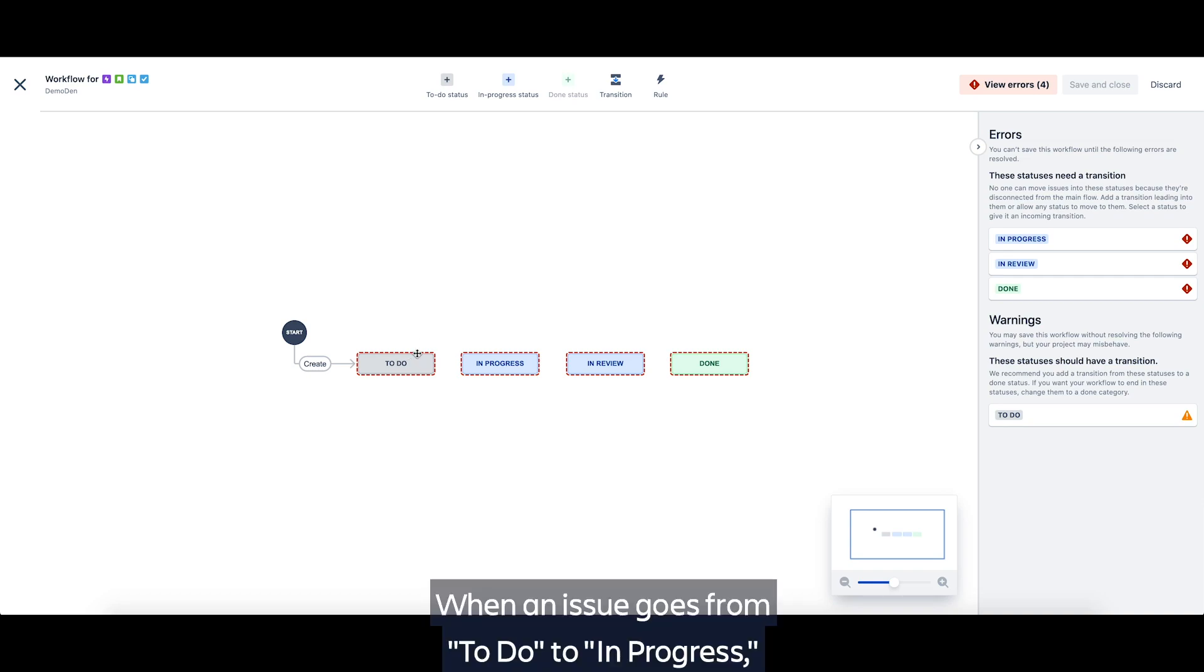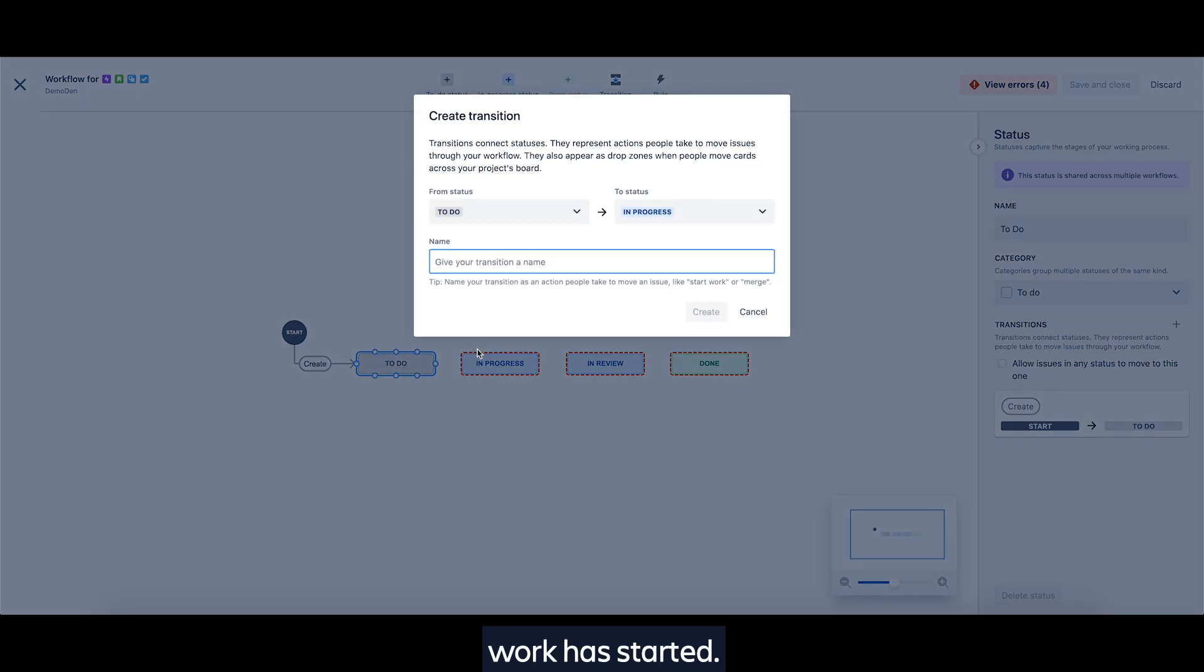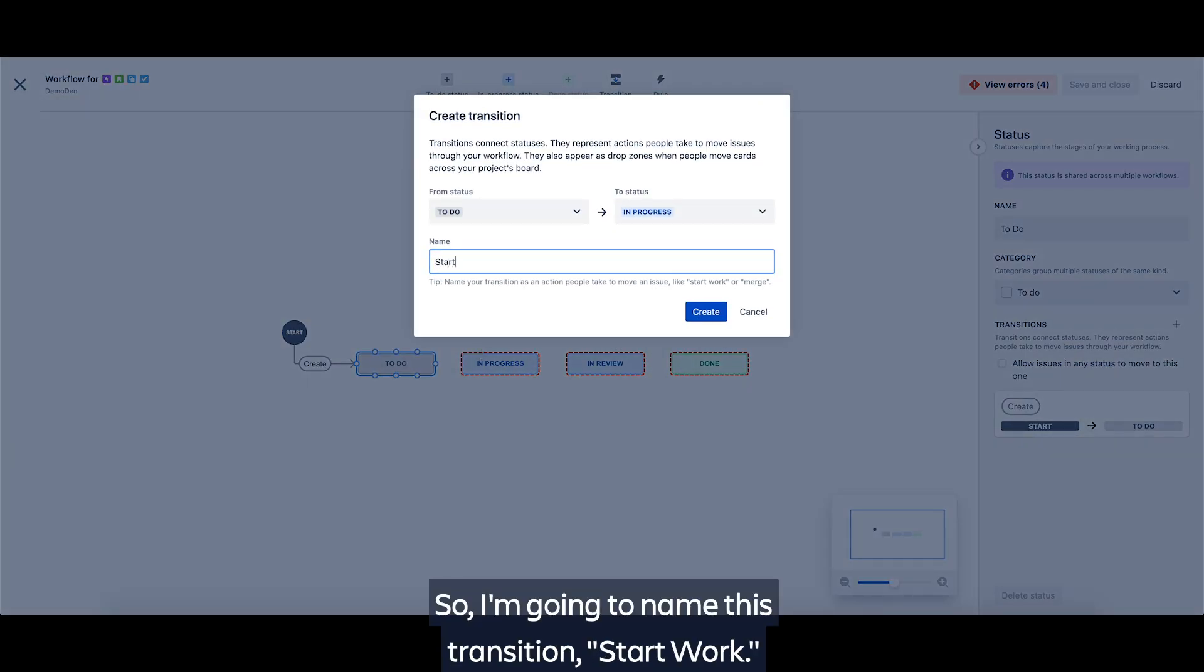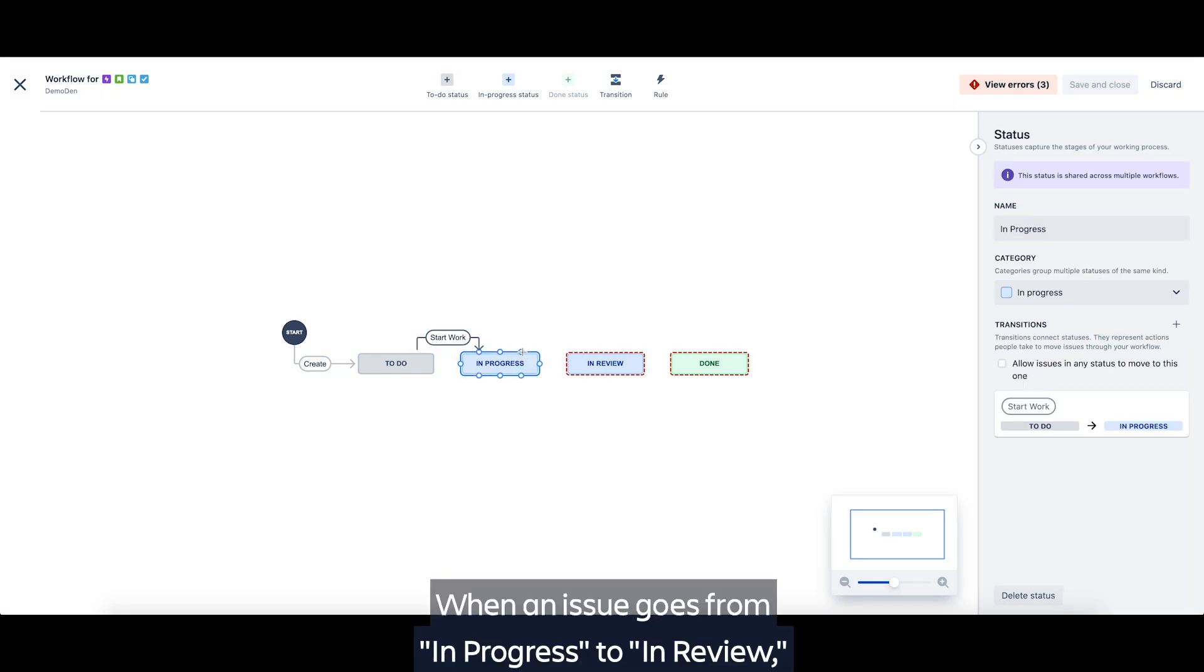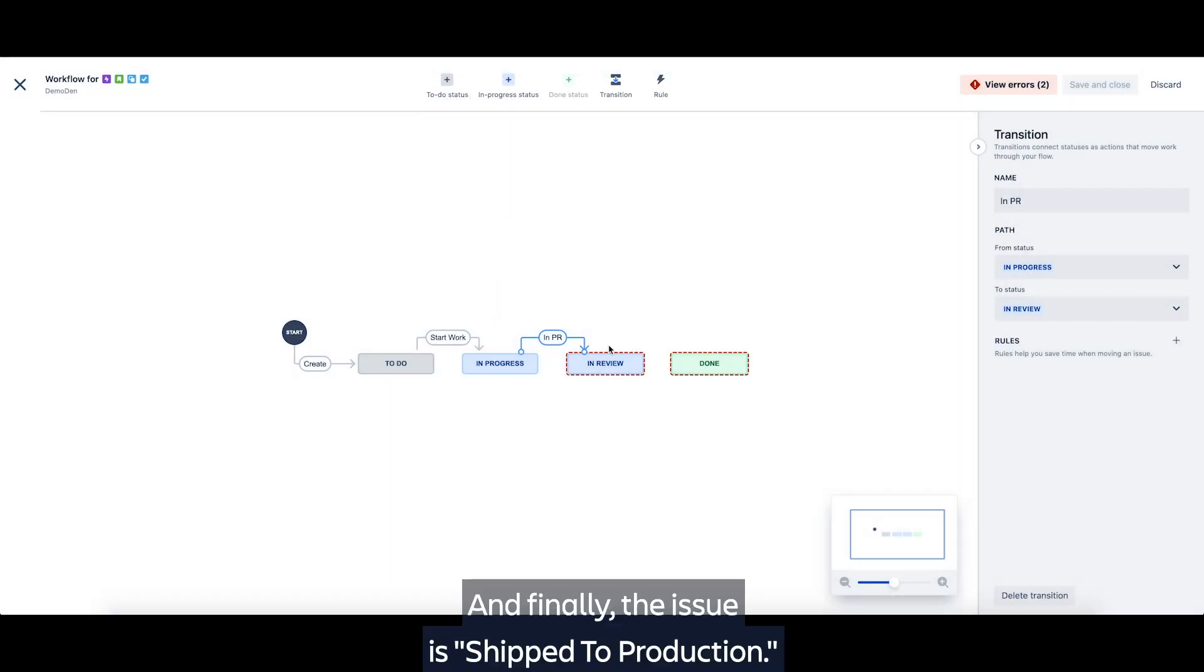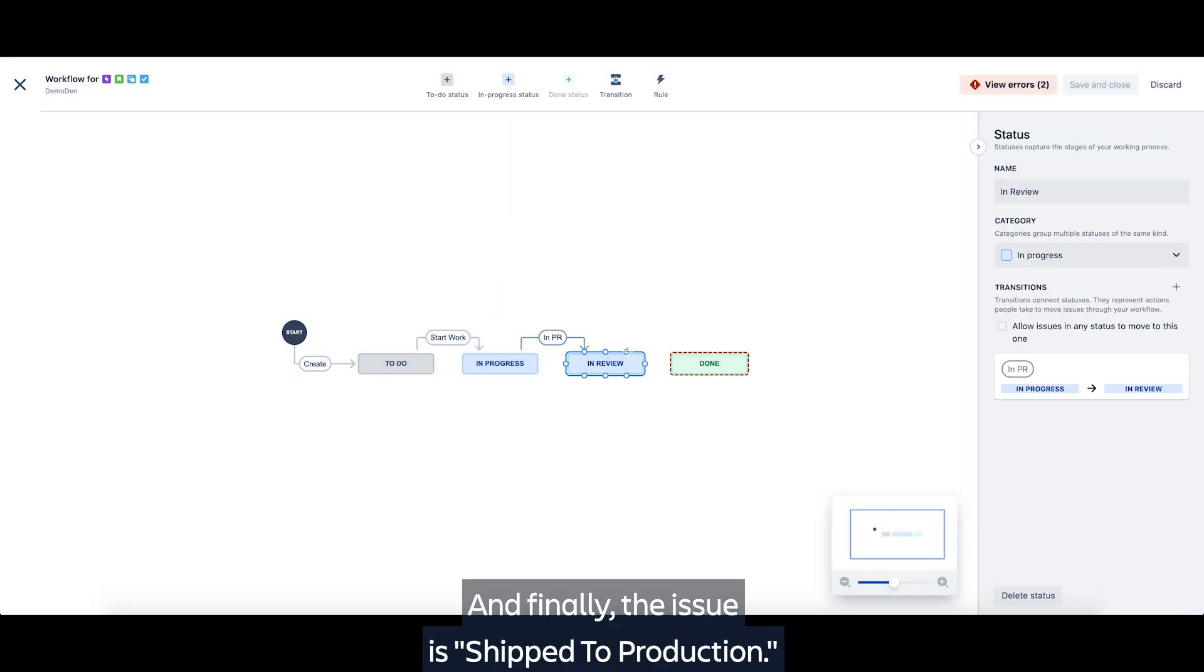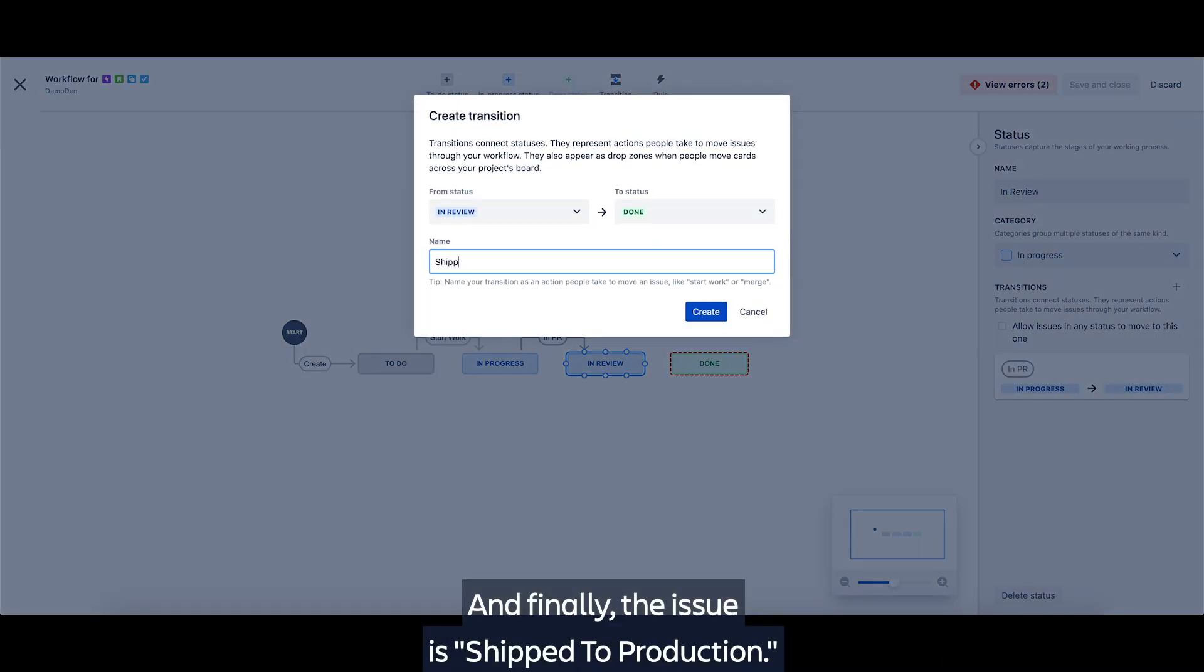When an issue goes from to do to in progress, work has started. So I'm going to name this transition start work. When an issue goes from in progress to in review, it's in peer review. And finally, the issue is shipped to production.